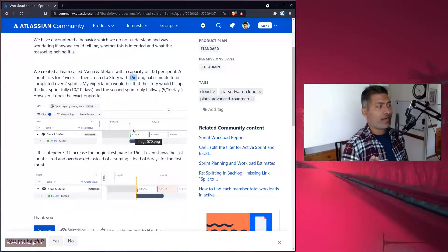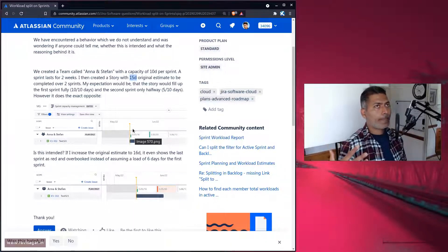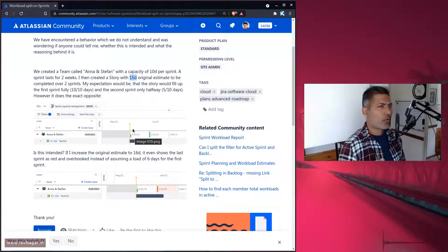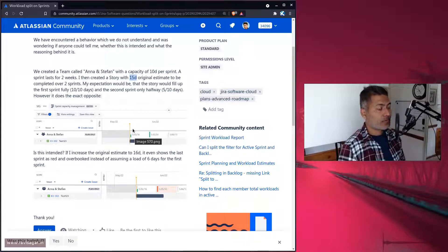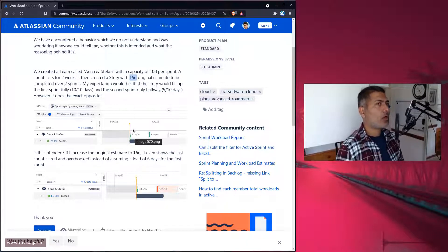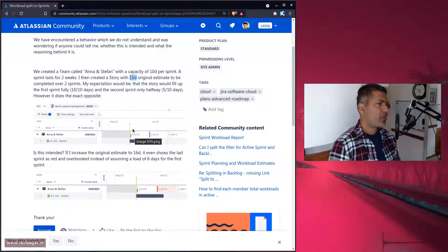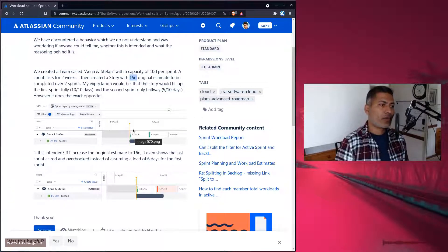If a story estimate is 15 days and it is more than what you can deliver in one sprint, then I think it is probably better to break it out further. For example, you can create two or three stories, or simply create an epic, so you have more breakup.